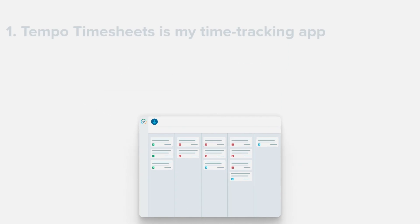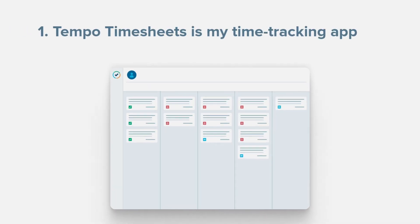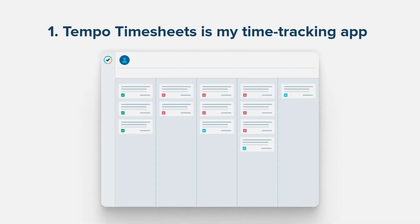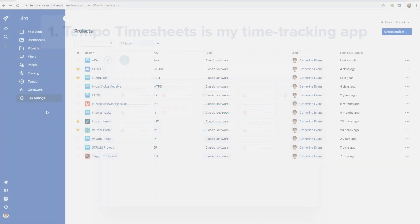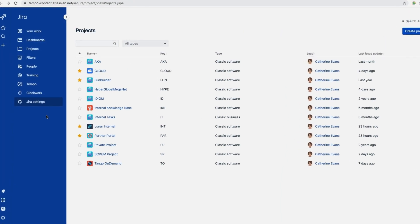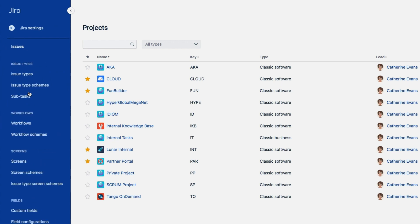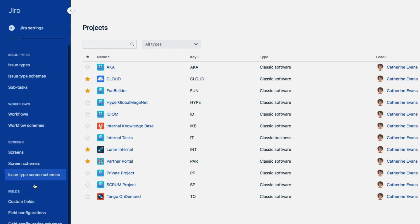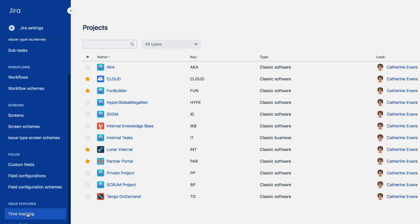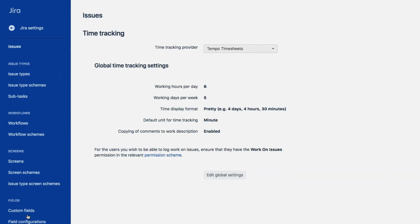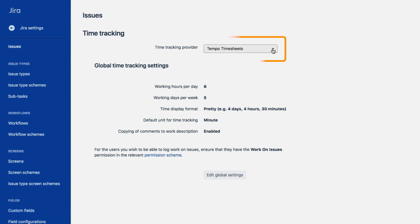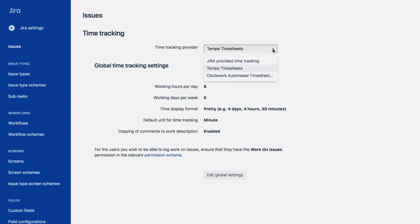The first thing I need to do after installing Tempo Timesheets is to make sure that it is the time tracking app that Jira is using. So I'm going to check. From the Jira settings, I'll go to Issues, and then under Issue Features, I select Time Tracking. And I see that Tempo Timesheets is set as the time tracking provider.